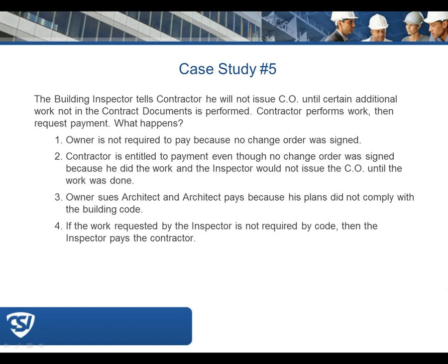And then Alan is kind of being tricky here. He didn't answer the question because even though an inspector may require something to be done by the contractor, it is possible that it is not a code requirement, and the architect would not be responsible for paying for something that provides added value. And then we have a few more comments down here. With regard to your comment about the AHJ requiring work, the GC typically tells the AE about the requirement, and the AE, in their opinion, must contact the AHJ office to confirm the requirement.